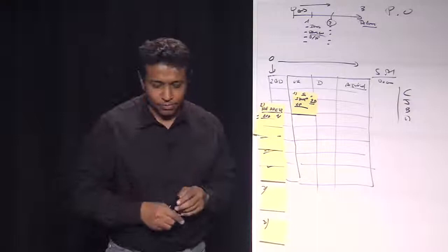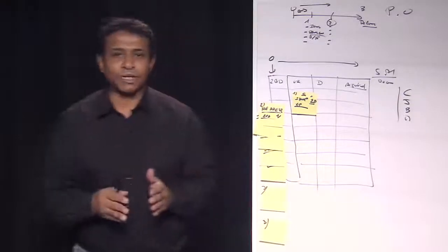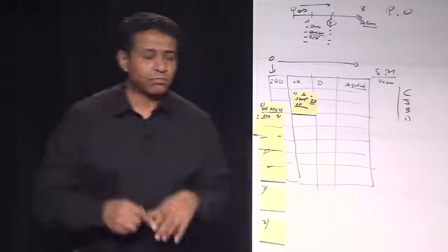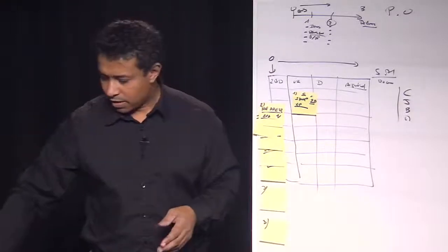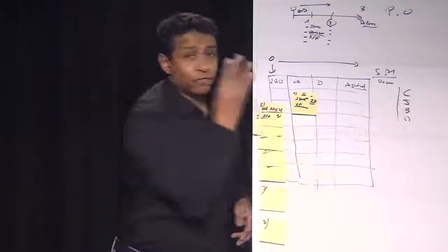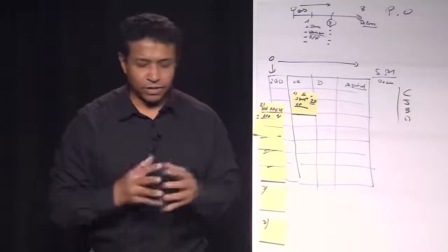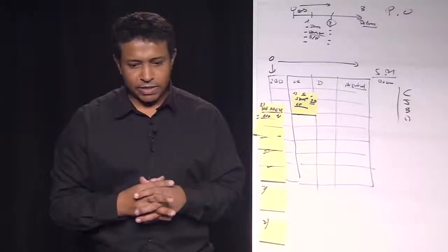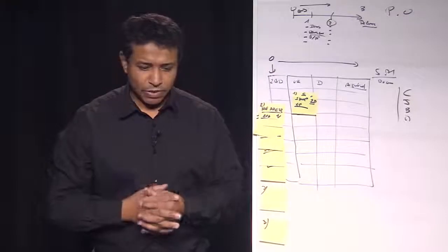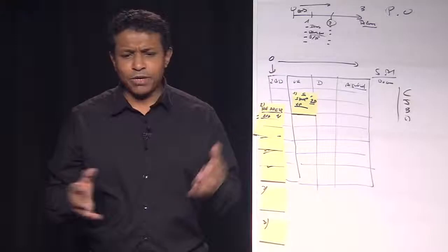The Scrum Master in the morning has got to hold what we call a stand-up meeting, meaning at 8 a.m., 9 a.m., or whatever, you come, you stand up and say, okay, today, what have we got to do? And we are day 0. We've got to do a website about our store. My PO asked me about that.